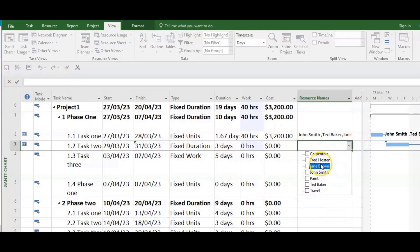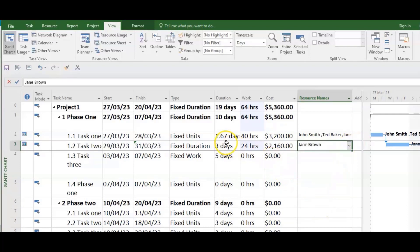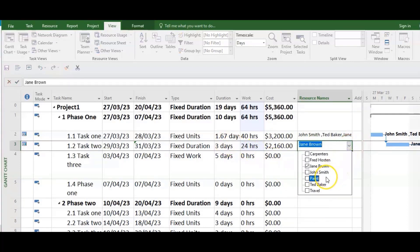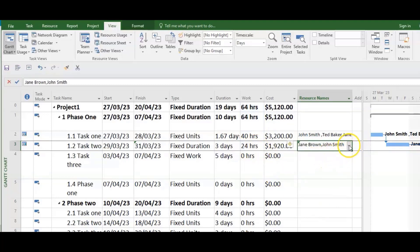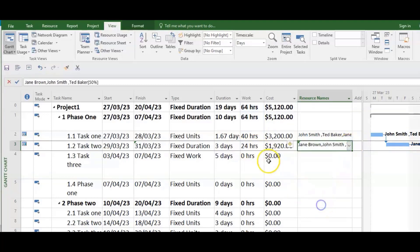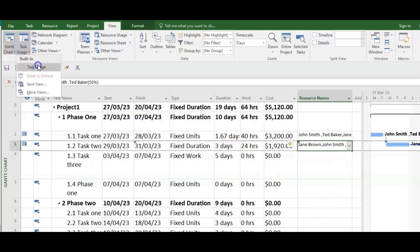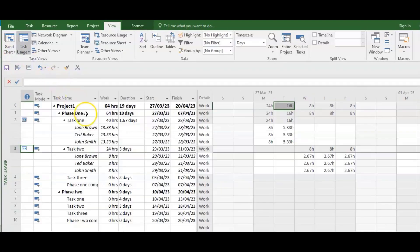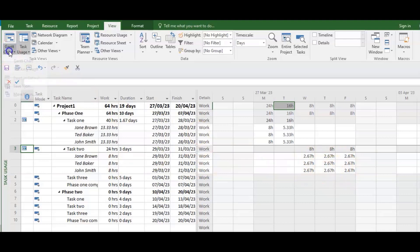As I add John it's still 24. And as I add Ted it's still 24. Going back into Task Usage, we can see each person got 8 hours — so the 24 hours was divided equally among all three of them.